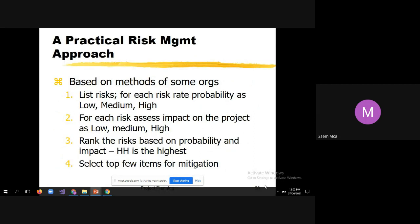Let us see a practical risk management approach based on methods used by organizations. First, list the risks. For each risk, rate the probability as low, medium, or high. Then assess the impact on the project as low, medium, or high. Rank the risks based on probability and impact — HH is the highest and LL is the lowest. For example, LM means the probability of the risk occurring is low and the impact is medium.